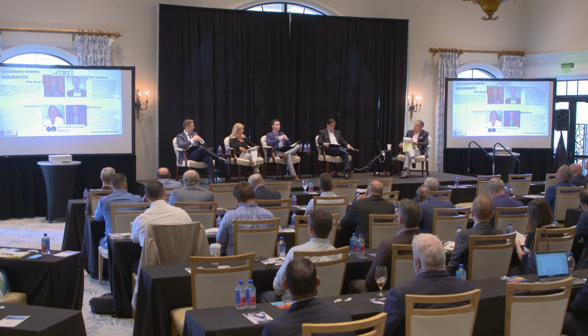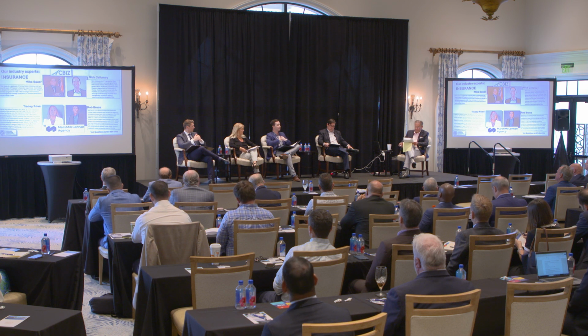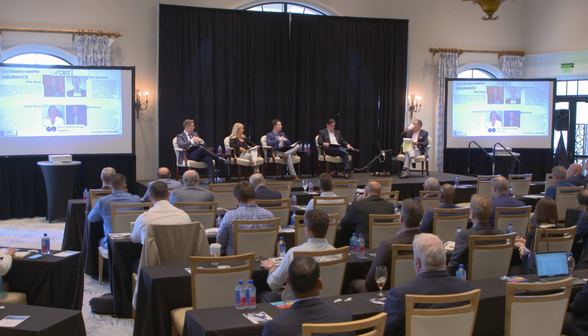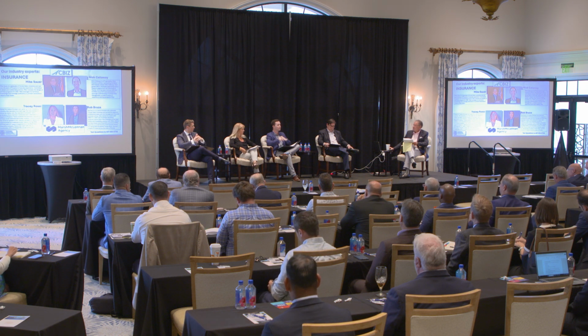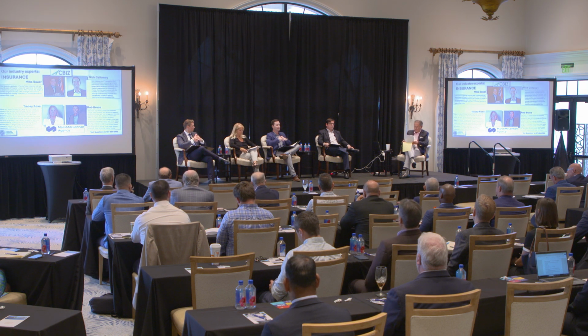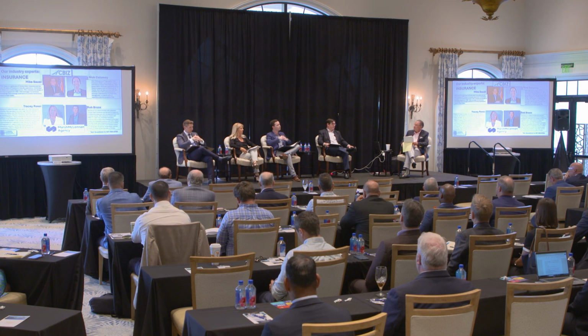And I just wanted to add to that. Tracy hit the nail on the head with the builder's risk aspect of putting that policy in the club's name versus the contractor's name. But I believe the question was specific to an OSIP or a CSIP type project. Those are popular with condominium associations because of the difficulty to insure them. You're going high-rise with so many different contractors and subcontractors, so there's one policy that all the different vendors are looped into. I personally have not seen a club do that style of insurance. It hasn't really been necessitated; the club buys their builder's risk and all the contractors have their own insurance.